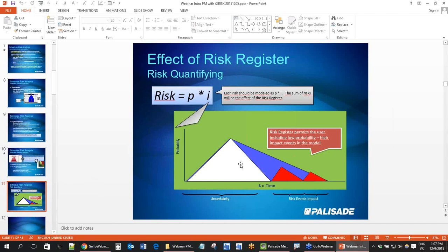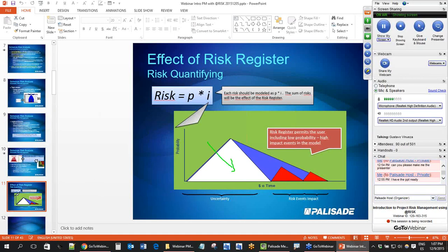And I'm going to use this graph to explain what we're going to achieve today. Every task has two components, right? One is the duration, which has uncertainty. That means a task can be regularly done, let's say, doing the foundation of a house between 20 to 50 days, right? Depending on weather, depending on the resource feasibility, depending on the design, etc. But this is under regular conditions that can take between 20 to 50 days, let's say.